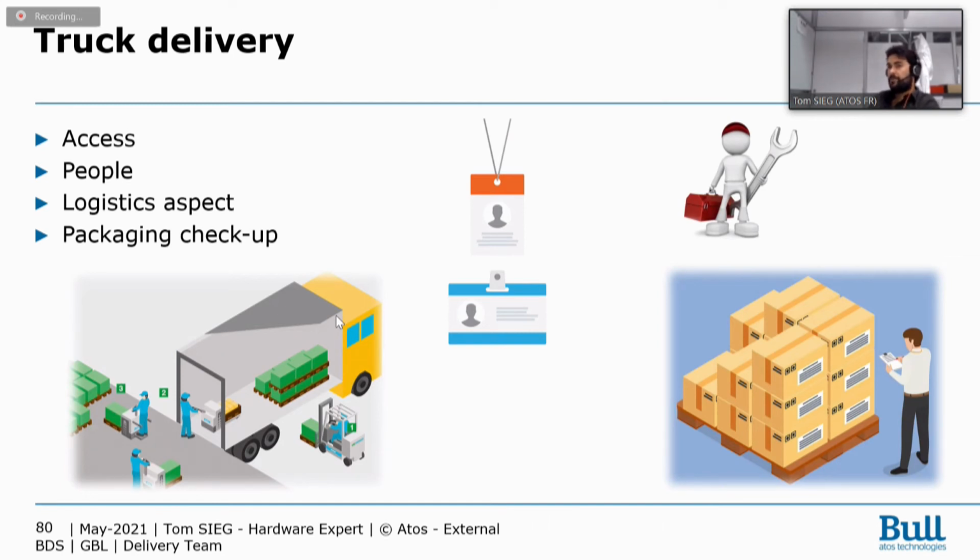The number of people, how many boxes, how many racks you will receive day 1, day 2, how many people you need to do the cabling, to put all the racks in place, material in place, servers in place, etc. Just to be prepared and to manage all the people on site during the truck's delivery.